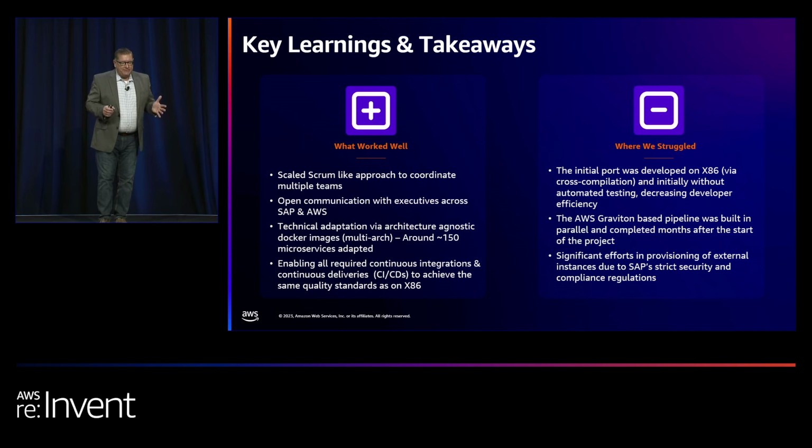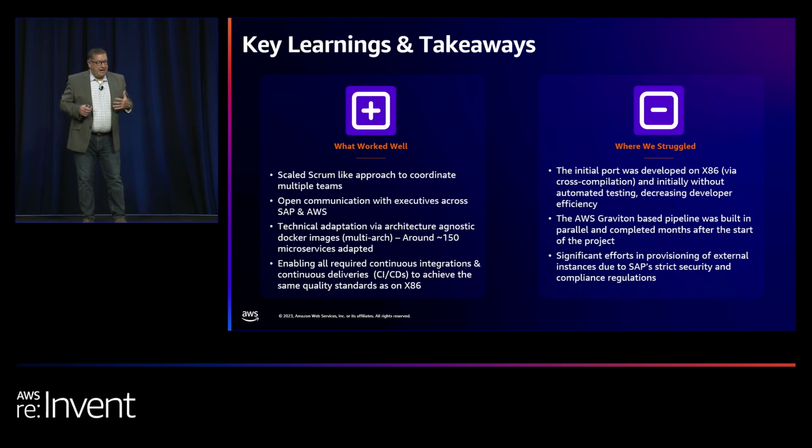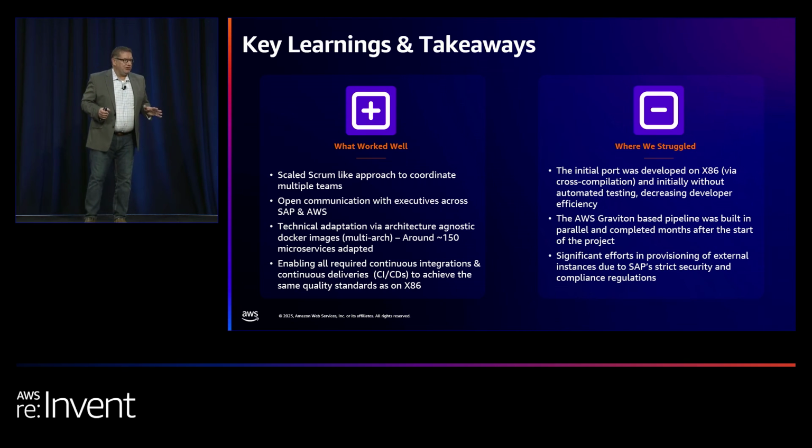Then also, there was effort in provisioning some external instances. Really, that was more of an internal issue, in terms of when a developer needed an instance to do some troubleshooting and analysis, getting access to that instance. SAP has very, very stringent security and compliance regulations, and so that was more of an internal process thing that we needed to work out so they could get access to that.